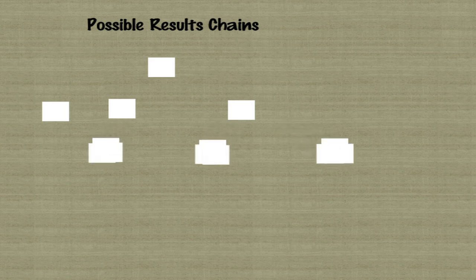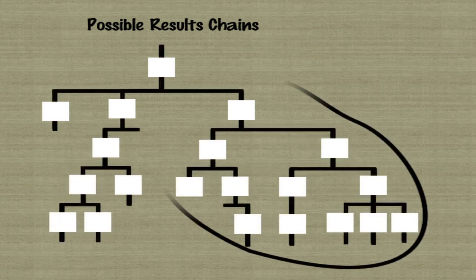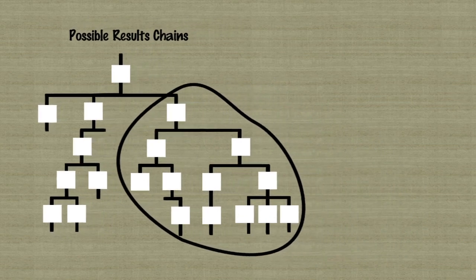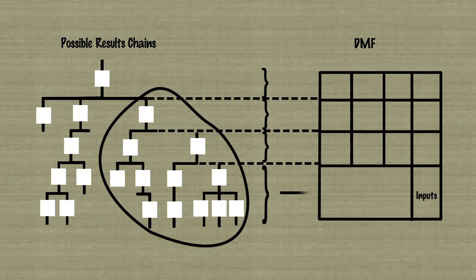The design summary describes the main elements of the proposed project. It also reveals the vertical logic of the DMF. The vertical logic is the means-ends relationship that emerged from the results chain. The vertical logic tests the soundness of the results chain by checking if the inputs are sufficient to carry out the activities, which have to be sufficient to produce the outputs. In turn, outputs are expected to achieve the desired outcome with the completion of the project. The outcome contributes to achieving the impact.